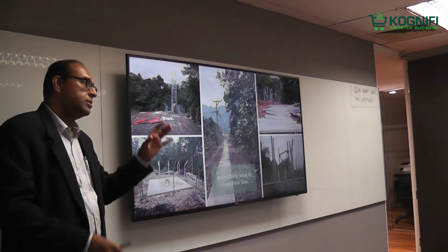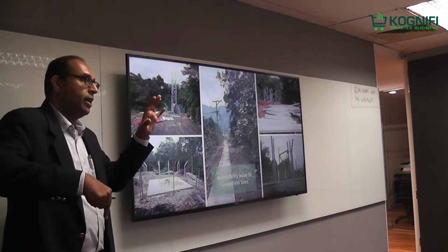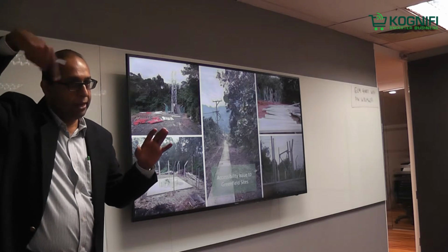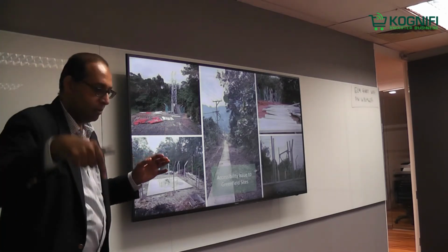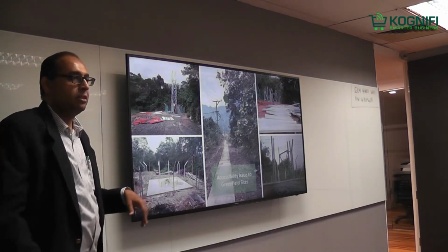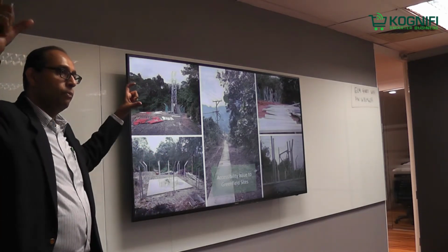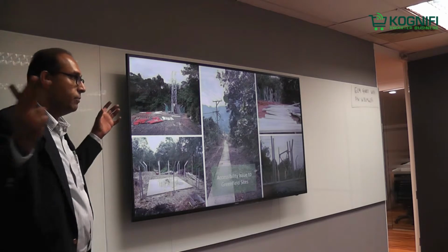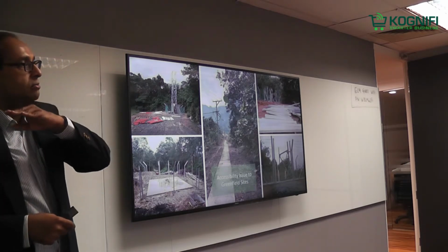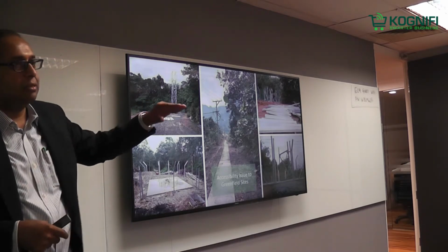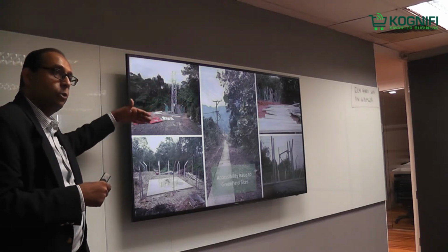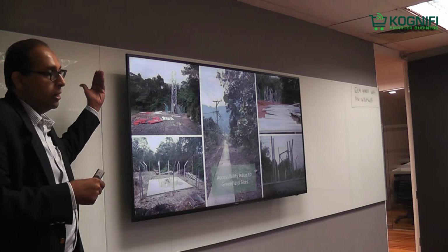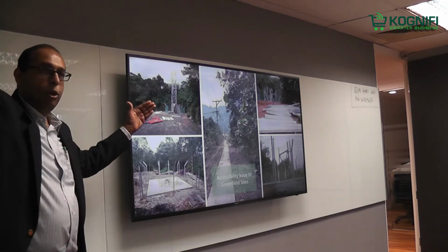Collector means, if this is where I'm giving out the radio signal, I also have a transmission backhaul. It can be cable, but here it's expensive for cable, so we use radio, microwave communication. So there must not be any trees, hills, or buildings between this collector tower, which is going to backhaul to the main exchange, and your proposed site.